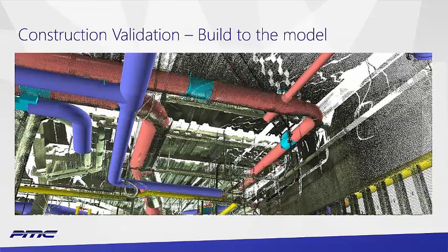We can come in, scan the space, and quickly verify whether or not people built what they said they were going to build. We can take a snapshot of the model that they said they were going to build, lay it over the point clouds, and depending on the square footage, this can happen same day. So you come out, do the scan, merge the models, and then everyone meets, sits down, and goes through it and reviews whether or not everyone was fulfilling their obligations.